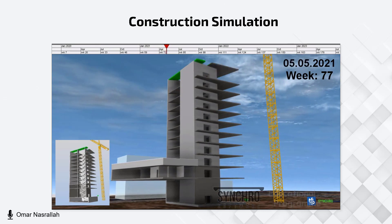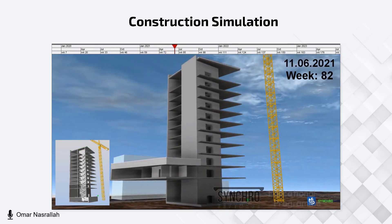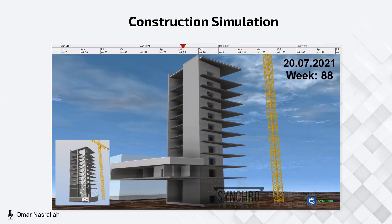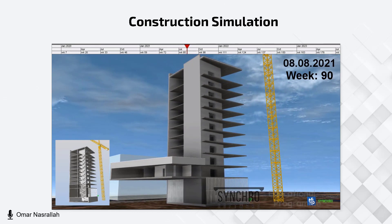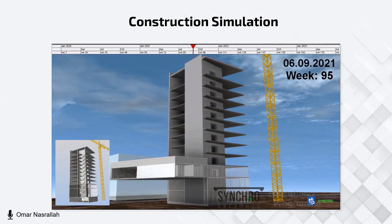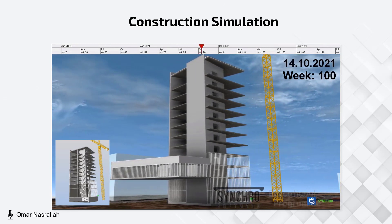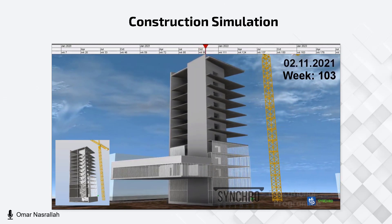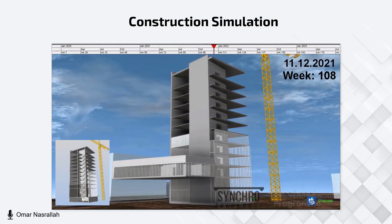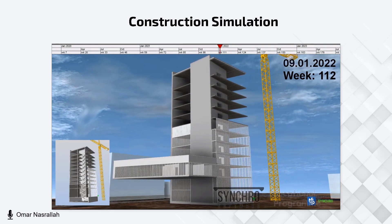Using the open BIM IFC format, the model was also imported into 4D software to achieve a better understanding of the construction simulation, reflecting both the construction phase and the project timeline. This allowed our site team management to identify safety issues during construction or construction element priority, giving the appointing party a clear picture of the project phases and the construction schedule.